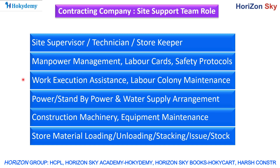For medium to large scale projects requiring high numbers of laborers daily, a fixed labor team works throughout the project and needs accommodation. A labor colony is built adjacent to the site, and the site support team provides and maintains water, food, light, gas, and all other necessities. The support team also assists with work execution at different stages as needed.